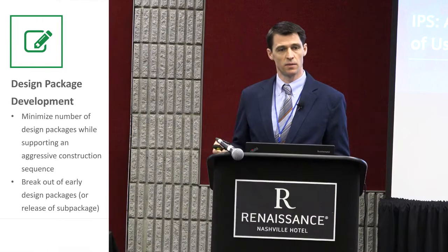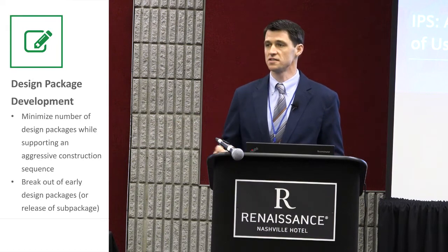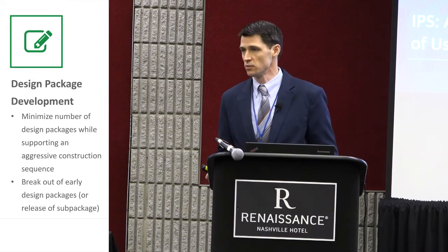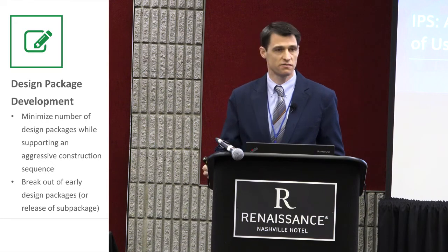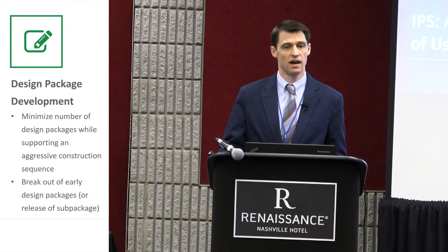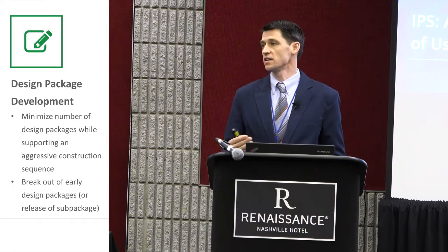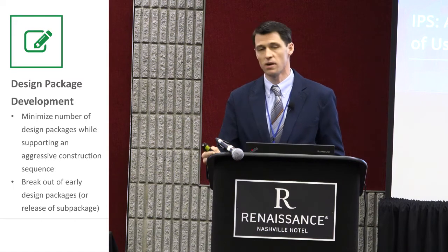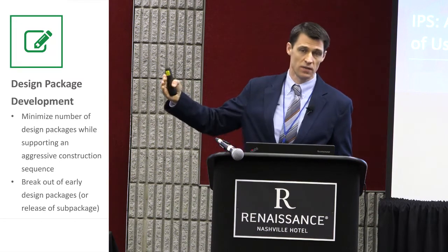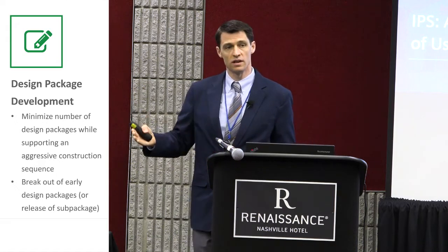Our design development right now, obviously the designer wants to give as few design packages as possible. It's more efficient for them, it's more cost effective. They don't need to be putting their pencils down all the time to issue design packages. However, if you recall our interdependencies graphic, that doesn't support the construction time frame. We need some packages tomorrow, and we may not need other ones for 2 years out. We didn't know that initially, 6 months ago.